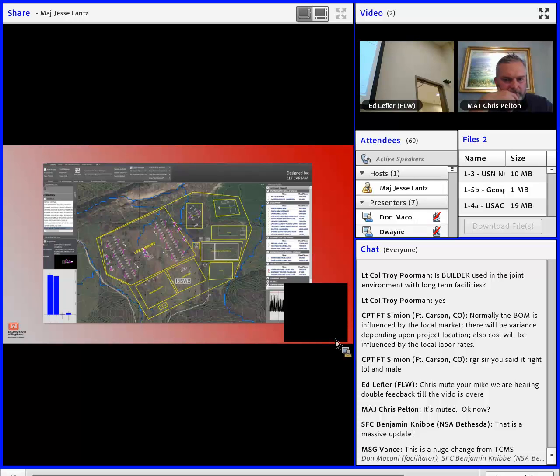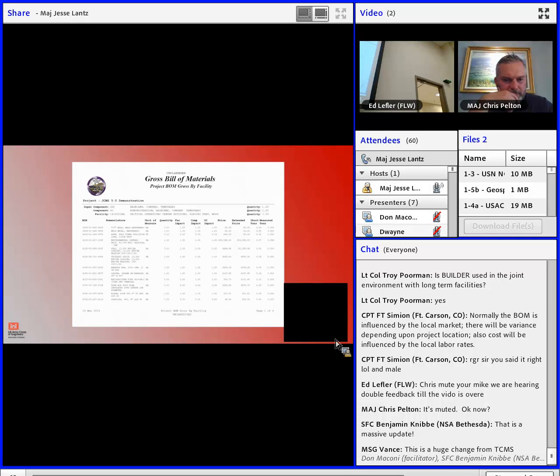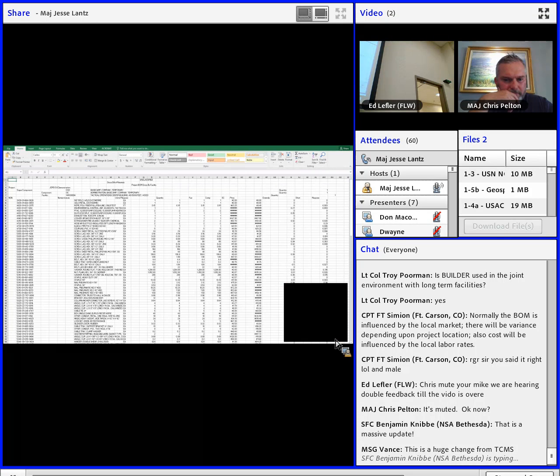During phases 1 through 3, joint engineer construction units or contractors utilize the master plans saved and shared from JCMS 5.0 to pull the actual drawings and bills of material for construction. These material lists will interface with DLA ordering processes and in many cases can be ordered ahead of true mobilization.